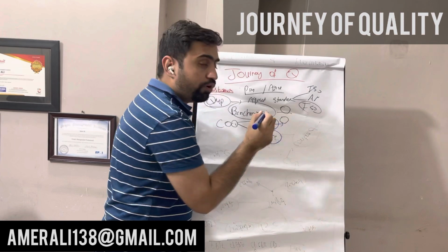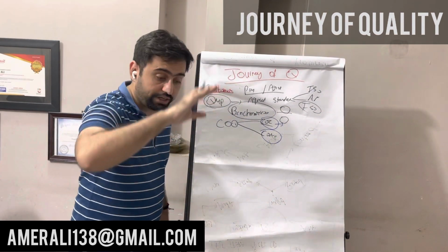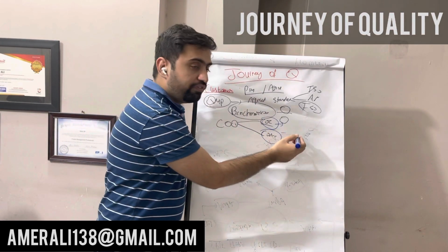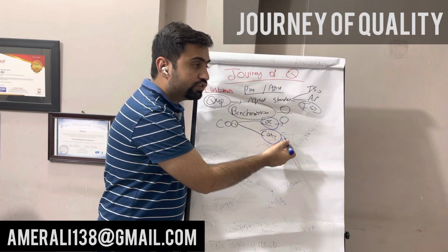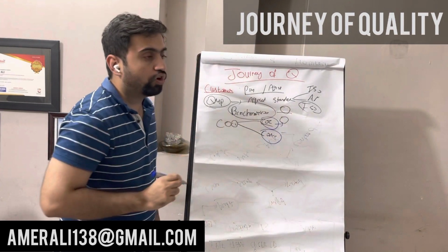Cost of non-conformance includes money spent due to failures. It can be internal failures or it can be external failures. So internal failures, rework, all those come here. Warranty cost, all those come in cost of non-conformance.